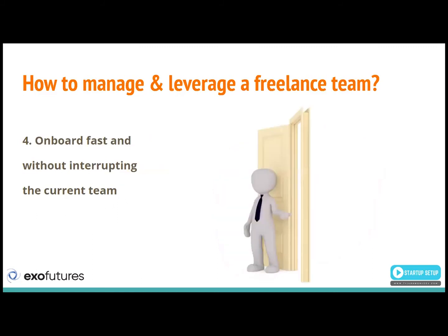Another thing that we need to think about is the onboarding. The traditional onboarding procedures that used to be common, and probably still are common in corporate culture, simply do not pay off here. Having like 2 weeks of orientation period, going around the company, learning about the history, all the departments, etc. Spending 2 weeks doing that, if this person is gonna stay with you for 3 weeks, simply doesn't pay off. So this onboarding needs to be super efficient.